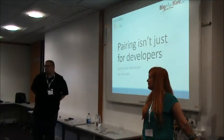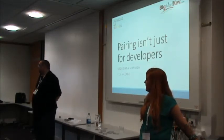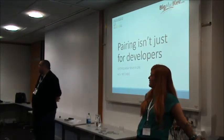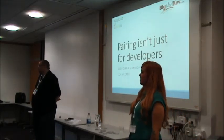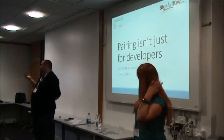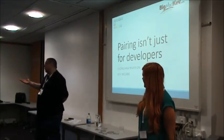What we found with our half-day swapping, in answer to the point raised, is that it allowed the team to make a choice of where they were going next. So there was kind of a negotiation about who you would go and pair with next. There's a little bit of playing favourites in there, but it could also mean you avoid people that you know you're going to have a problem with. It's the self-organising stuff. It's also making sure that your stories are small enough so that they can be half-hour turnovers.